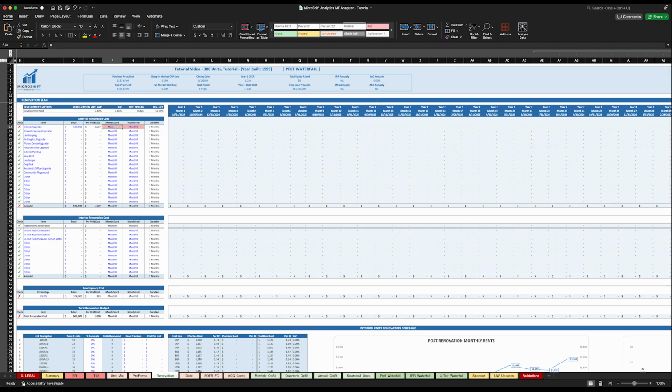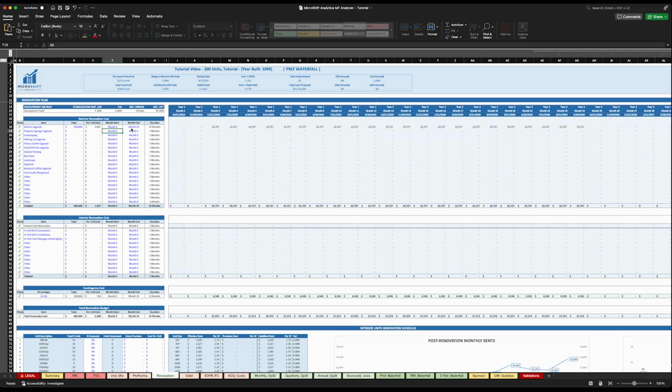The analyzer is going to notify you right now the check is giving you an error because you didn't specify a renovation period. When do you plan on starting your renovation, and when do you plan on ending? Let's assume we plan to take about 2 years to renovate this property. We plan to start in month 3, as the first 3 months we'll be just getting acquainted with the property, and we plan to end the renovation by the end of the second year.